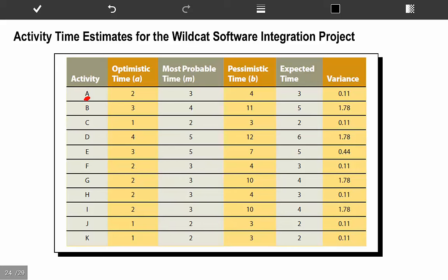The biggest difference between PERT and what we've been doing, CPM, is instead of just coding one time for each activity. Earlier, for activity time, we had one code for the time. Say it will be done in 3 weeks. You can do it in a week if you want, but it costs more money.